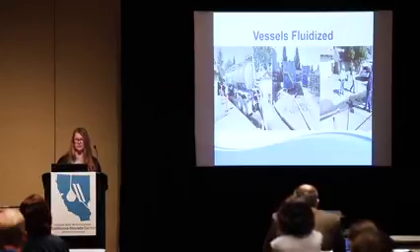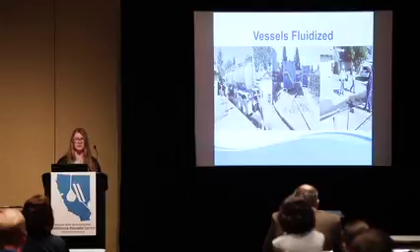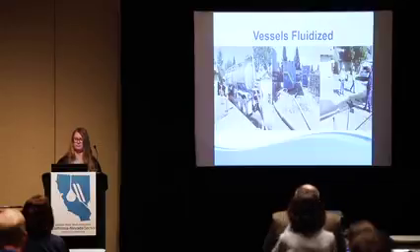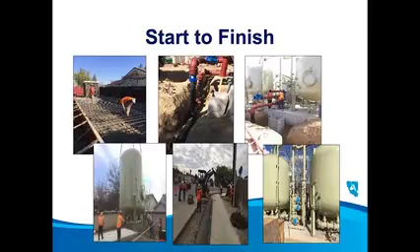And in some cases, there are some real discharge challenges. At some of the sites, they may have to bring in Baker tanks, or there's discharge out to the street that has to be monitored and has to comply with our NPDES permitting. So here's just a little look at the process from start to finish, a pictorial of some of the different steps. There were a lot of safety concerns along the way, so we really made sure that everyone had a focus on that, and we were able to get these installations safely installed.